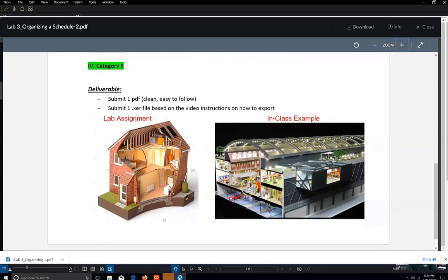It looks like we have a deck as well as some type of framing, probably held up by steel. So I'm just thinking of these broad categories. I've got a foundation, a superstructure as we call it, but that's really our steel framing. And then in every building, we've got a roof, some type of exterior, and some type of interior. So really, this section view is a great place to start when we build our WBS.